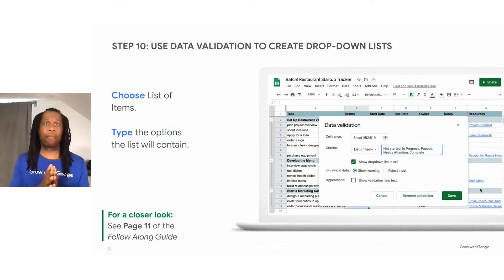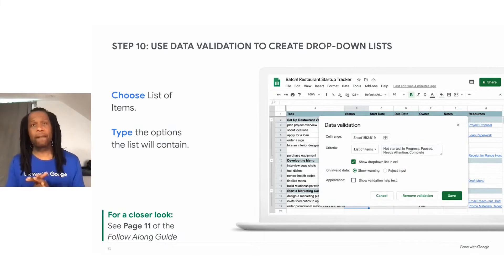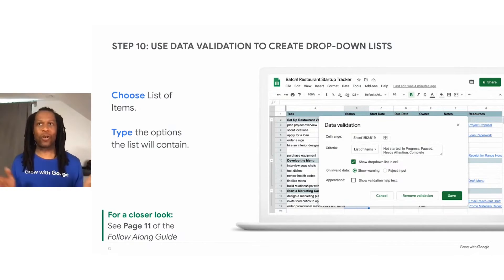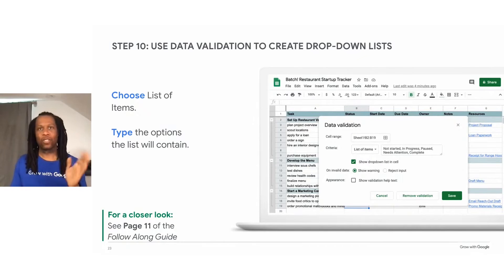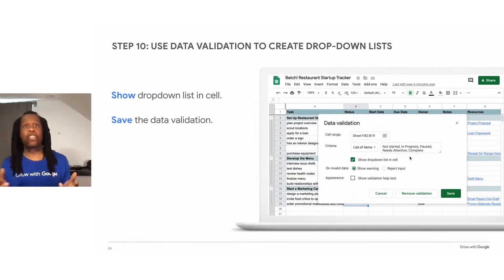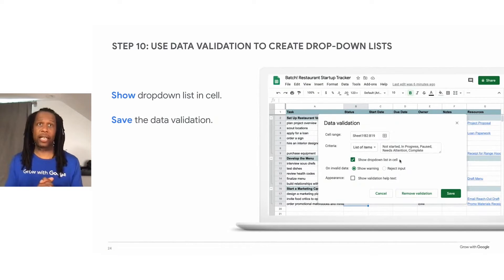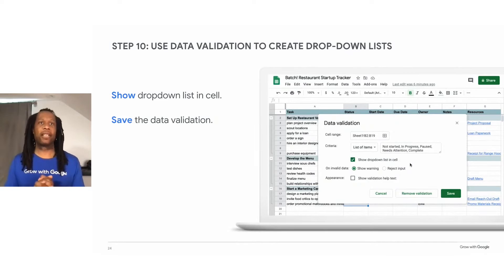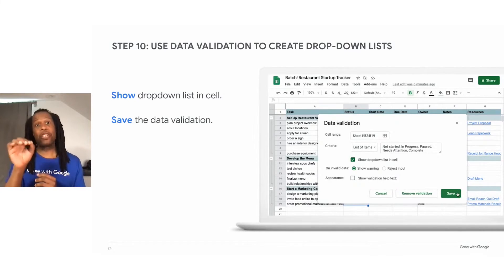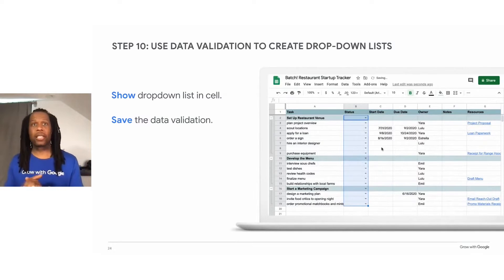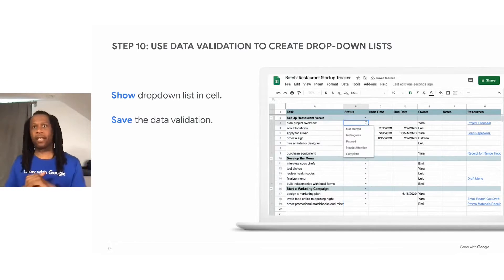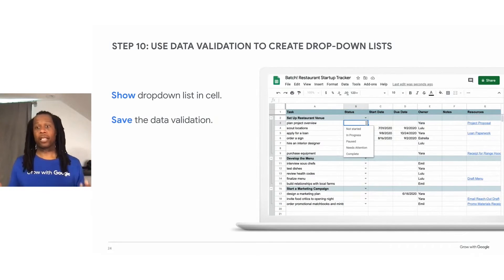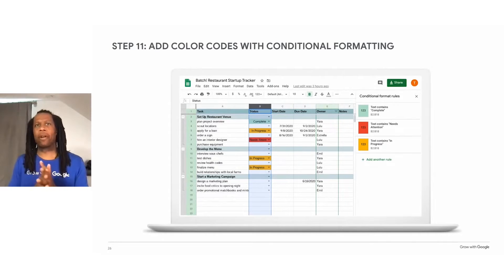Make sure that you separate the items in the list with commas. If you don't do that, you'll have a single choice for all those in just one word. It won't look right. So separate each item with a comma. To finish your list, make sure the show dropdown list in cell box is checked, and then save the data validation. The project tracker now has a dropdown menu in each of the cells of the owner column.